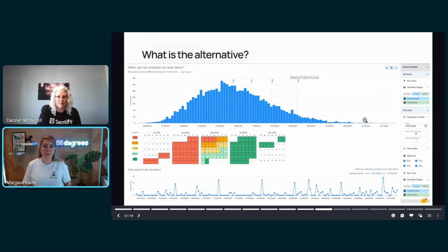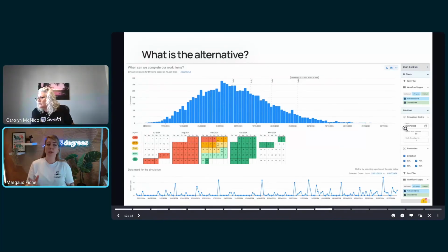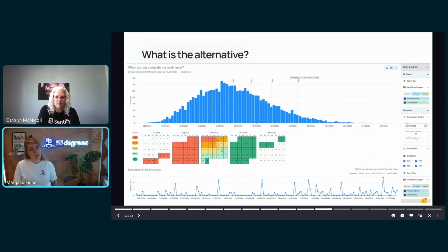And here, for example, we're on the Monte Carlo when. I would like to know, when will I be done with 50 items? And you could put a range as well. That works exactly the same way. So if I start work on the 25th, that was, let's say, today, and I have 50 items, how long will it take me to complete those?